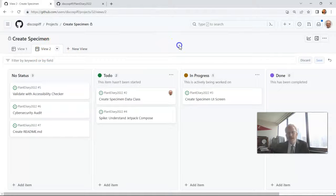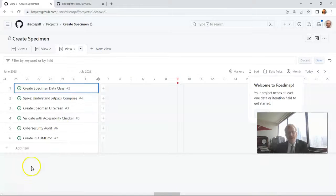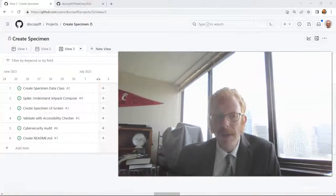We can configure the board view, add more columns, and even automate it with a workflow, which we'll cover in a separate video. Another view available is roadmap view, which is similar to what we'd see in JIRA called timeline view. It shows a sequence of these epics — what's prerequisite, what has to come in the future — and can give you an idea of how to lay out your work and what's really achievable in a certain time period.